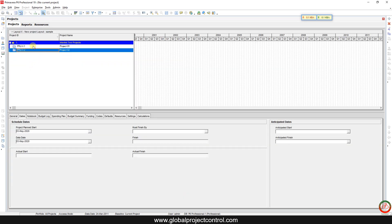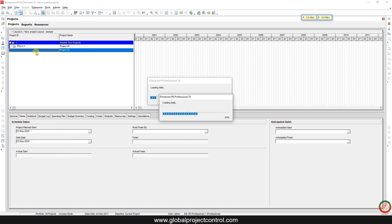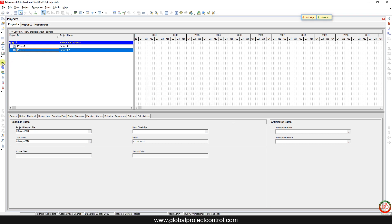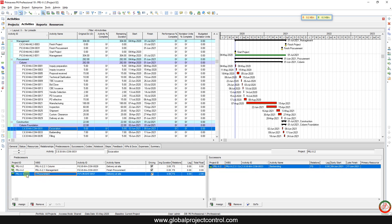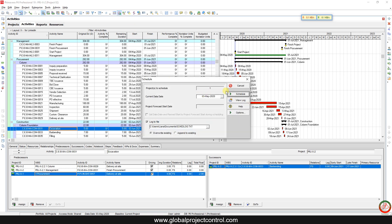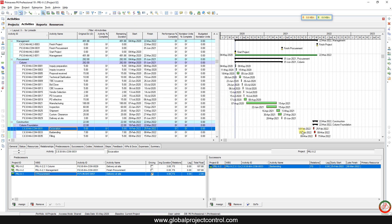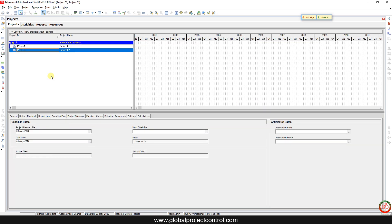I open the activity list and open the second project. Looking at the task, you can find that I have one external relationship on this activity. When I schedule the project, as you can see, the external relationship is reflected and drives my project duration according to the available links. So even if your project is closed, it is still reflected in your schedule. Be careful about external relationships between two projects.